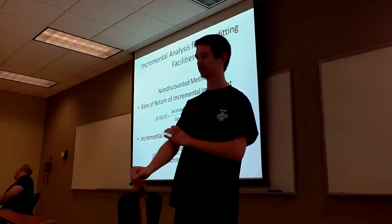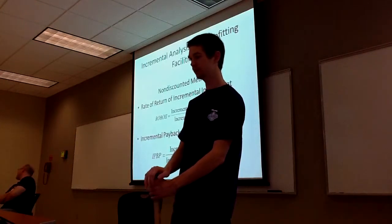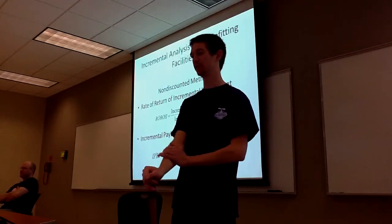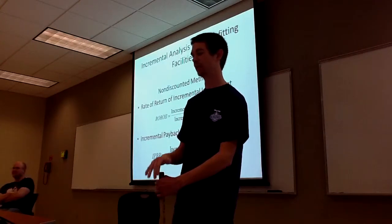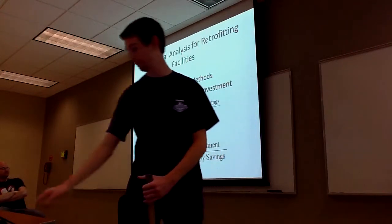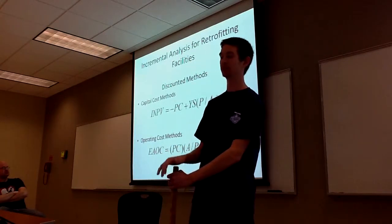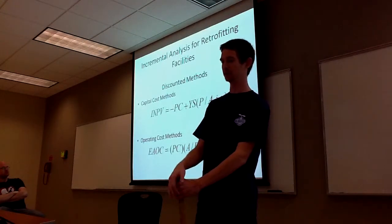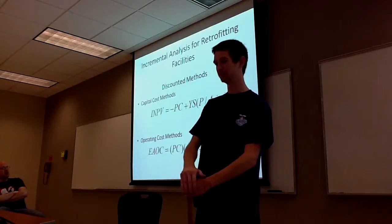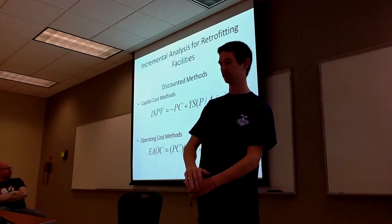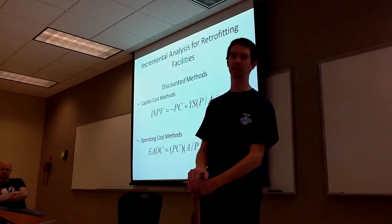There are also incremental analysis methods for retrofitting facilities — this is when you already have a piece of equipment but are looking to upgrade or replace it. Non-discounted methods include the rate of return on incremental investment, which is your incremental yearly savings over your investment, and the incremental payback period, which is the inverse of that ratio. Discounted methods include using capital cost, where incremental net present value equals project cost plus yearly savings moved to present time, and the operating cost method, which annualizes the equivalent annual cost over a period of time.